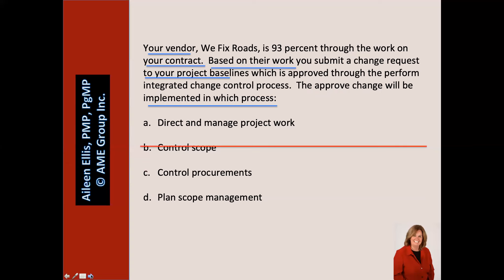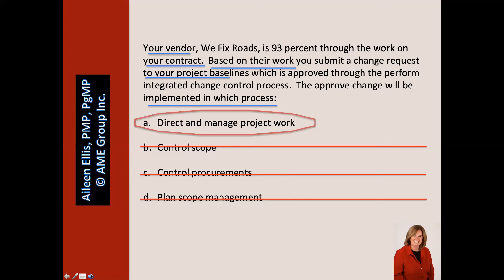In this question, the right answer is not Control Scope, not Control Procurements, and not Plan Scope Management. In this case, the right answer is Direct and Manage Project Work, because the approved change is related to the project. We know this because it says it's a change request to your project baselines. Therefore, change requests that are approved get implemented in Direct and Manage Project Work if they're related to the project, and in Control Procurements if they're related to the contract.